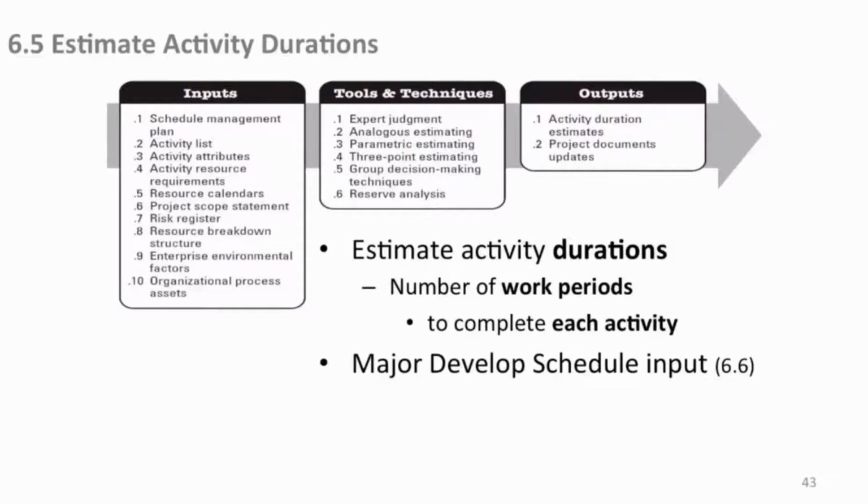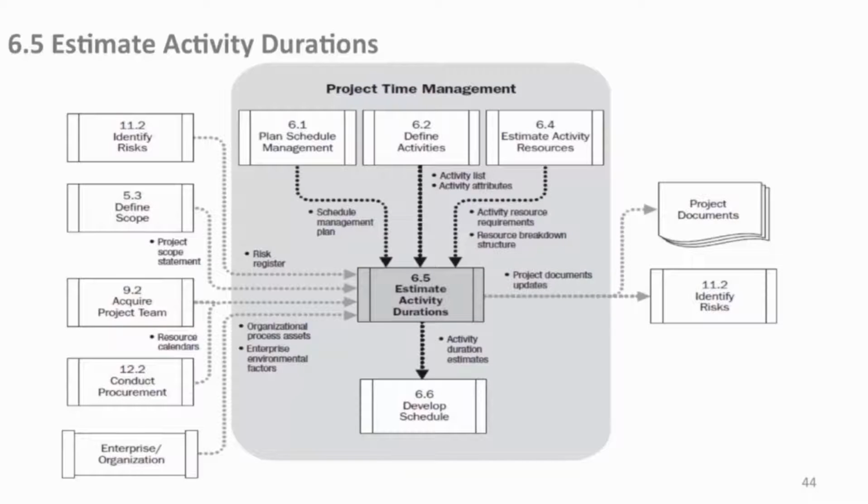You would use a lead or a lag for those kind of issues, arbitrary impositions of more time or less time. So the duration here is a pure duration, irrespective of whether you have to wait for something or not. If it takes an hour to do this task, and you've got to wait a week for something to come in, it's still an hour task. Okay, so that's what you do here, and it all leads up to developing our schedule finally, the real schedule.